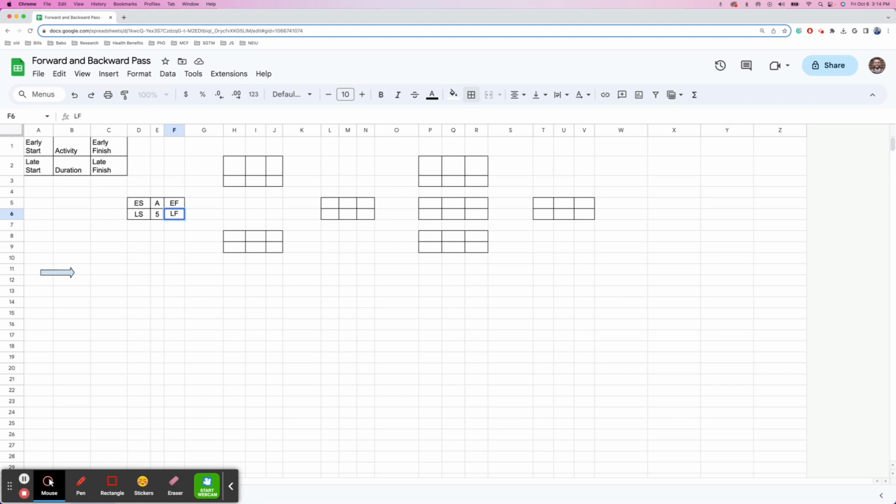So now, how we actually create the arrows to do this. So as we know, A is the first activity in the network diagram. And the next one that we have, based on our diagram from the slides, is B. So let's fill this in. So B, duration of 20, and then just kind of fill these in: ES, EF, LS, duration, and then LF.